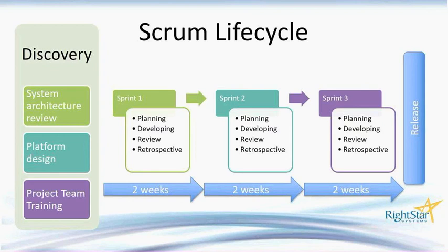In the Waterfall method for development, you would gather all of your requirements up front. You would have a very set list of requirements. You'd send your team away to build based on those requirements. 18 months later, they come back with a product. They're very proud of themselves. Everything works great. And unfortunately, in those intervening 18 months, the requirements of the organization have completely changed, and the product no longer fits the needs of the organization.